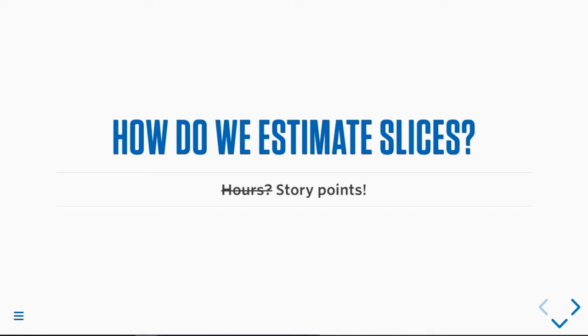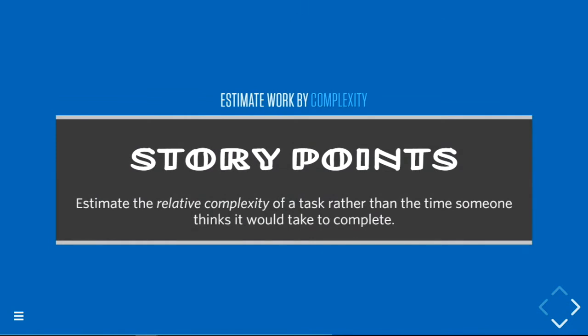Anybody else? Okay, so how do we estimate these slices? We don't use hours, we use story points. Because story points allow us to estimate by complexity. You estimate the relative complexity of a task rather than the time someone thinks it would take them to complete that task.